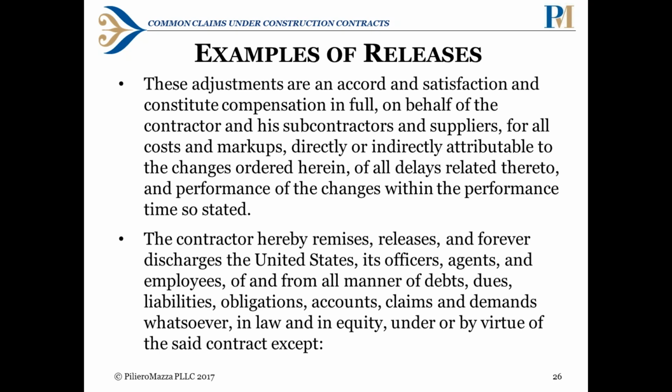And I think it's worth noting the first one incorporates costs that your subcontractors or suppliers may have. And we've seen cases where a prime contractor isn't aware of any claims, or it's content with the compensation that it's gotten for any costs that it faced, and it signs this kind of release. And then a subcontractor submits a claim. And once you sign this, you can't go after the government for your subcontractor's claim. You may be on the hook if the subcontractor is able to show that it's entitled to recovery. So it's a good idea before signing these, even if you think you're okay and you don't have any claims, to check with your subcontractors and make sure you're all on the same page, and have your subcontractors be signing similar releases when they're getting paid or getting modifications to help protect you.